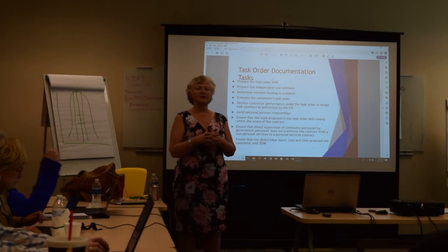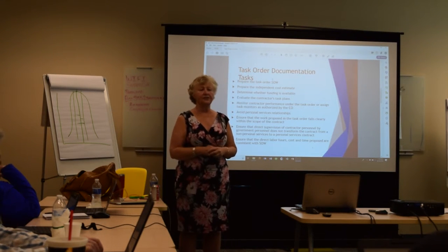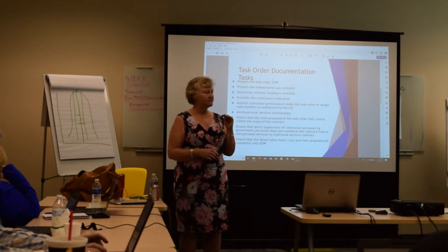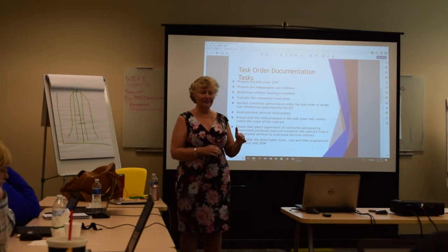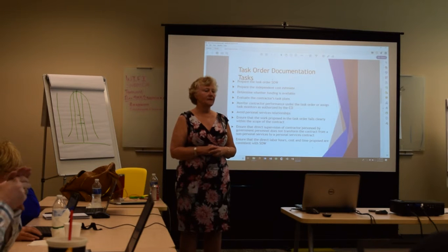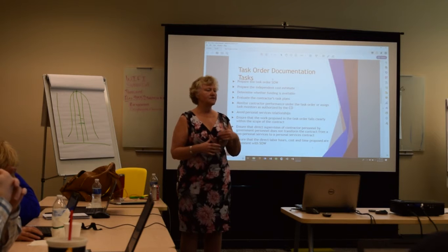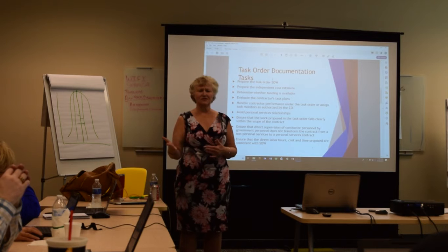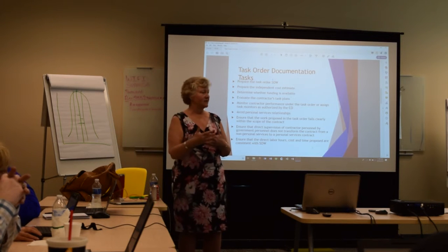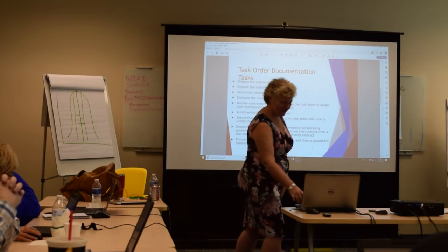So one thing companies will do is they'll say, here's my high-priced systems engineer 3, and here's my medium-priced systems engineer 2, and here's my brand spanking new, can barely spell systems engineer level 1, right? And so to win the work, they might say, I'm going to use 100 hours of systems engineer 1. So the government would look at that and say, wait a minute, who's managing this? This person barely got out of college, and we need somebody more expert to be able to figure that out.